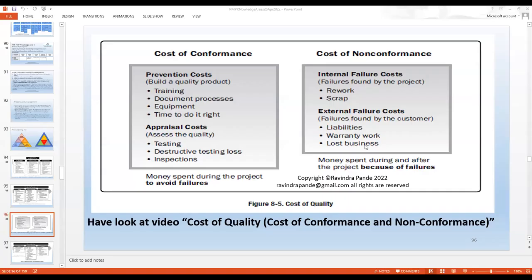Cost of quality is all the efforts you spend for preventative cost, appraisal cost, internal failure cost, and external failure cost. We should avoid all types of failures by working efficiently and doing things right the first time. Whatever we need to provide — like training, templatization, the best possible equipment, and time to do it right — this is the learning curve. Whatever you process through the initial phases of a project or onboarding of resources to make everything right the first time is included in the cost of quality.